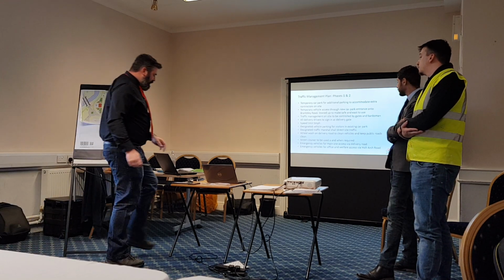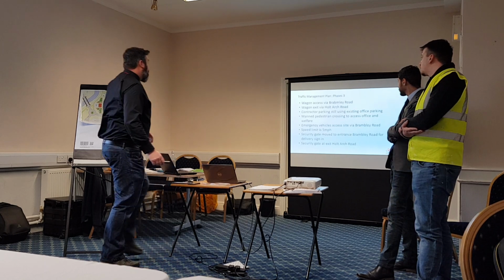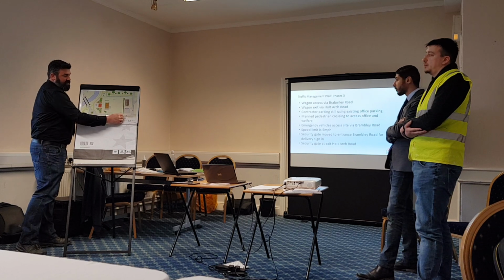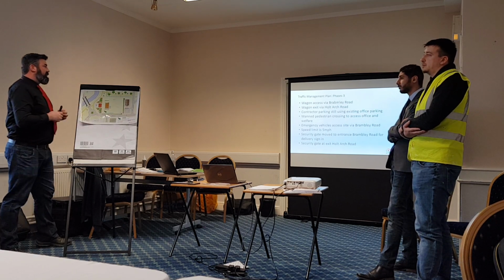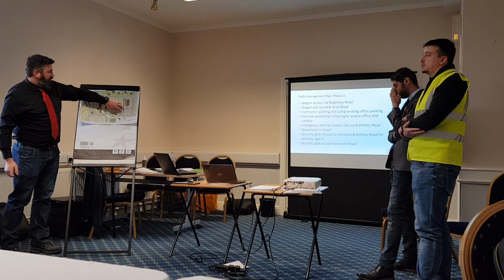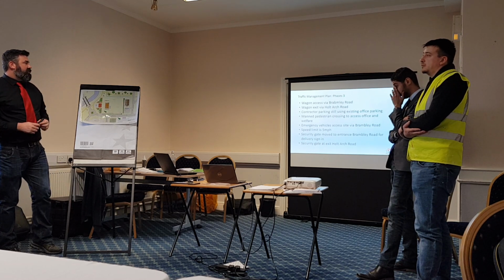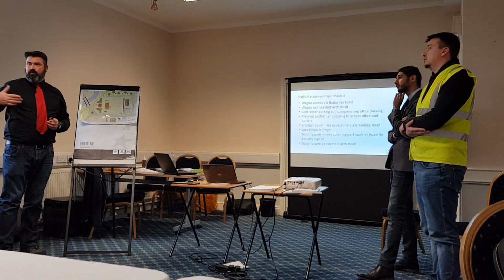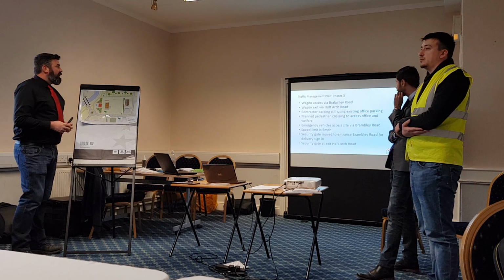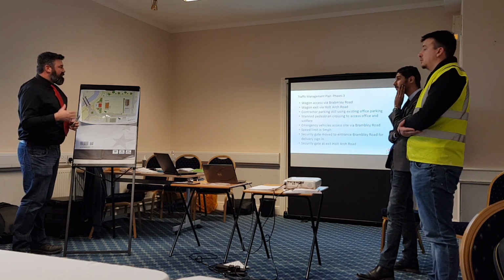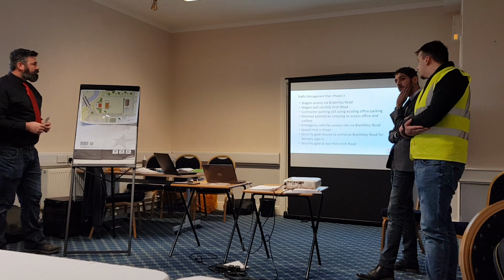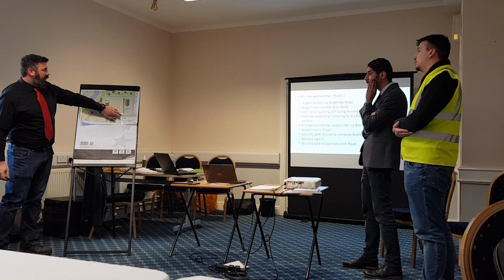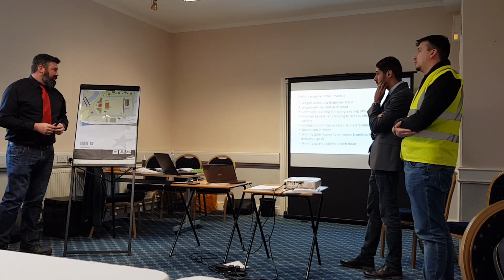Once we get to phase 3, we have to change things slightly, adapt the traffic management plan. As you saw, we have a road access in here and out there, so that will be the wagon access for this development through here. The pedestrian crossing will be manned, and there'll be red hoops either end, and signage to make sure that people don't cross the road without looking first. Again, 5 mile/h speed limit, which will be signposted, and the security gate will be moved to the entrance of Bramley Road, which is down here, for delivery of materials.